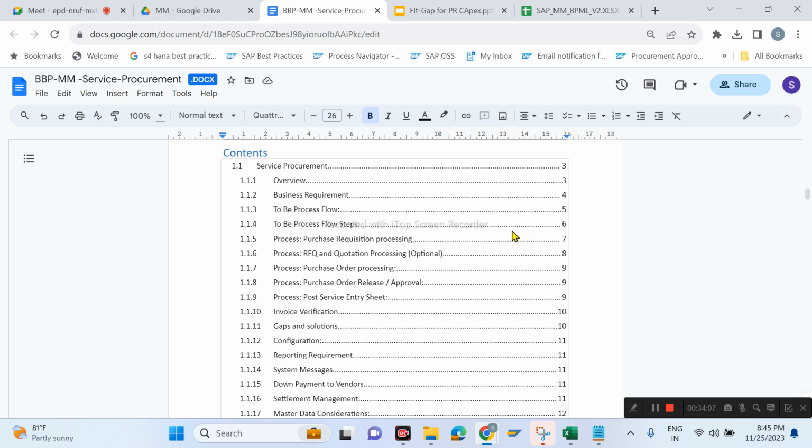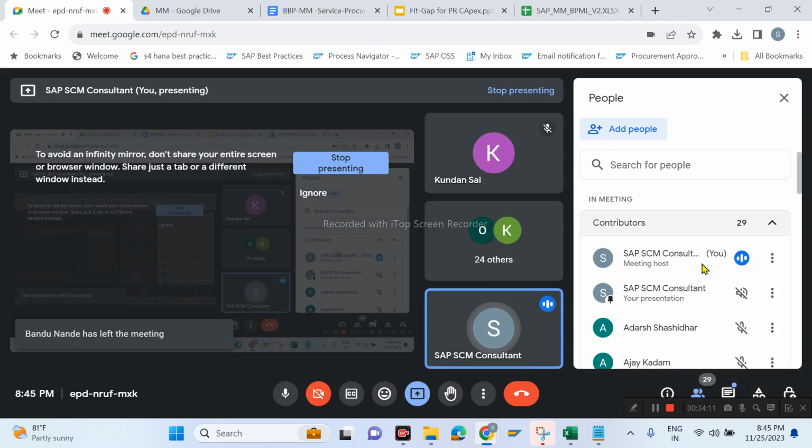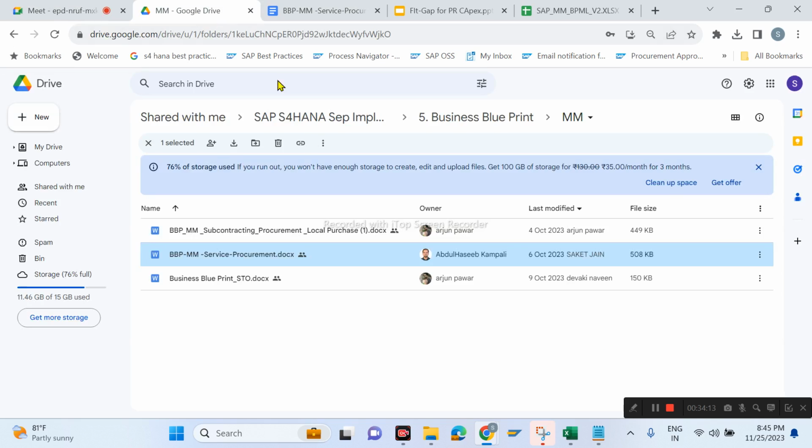And second, we need heavy equipment, right? Do you think that the heavy equipment, I mean the machinery, will be purchased? The critical machinery, definitely yes, the construction company will purchase it, but the machines which they use very rarely, they will go for a rental basis.